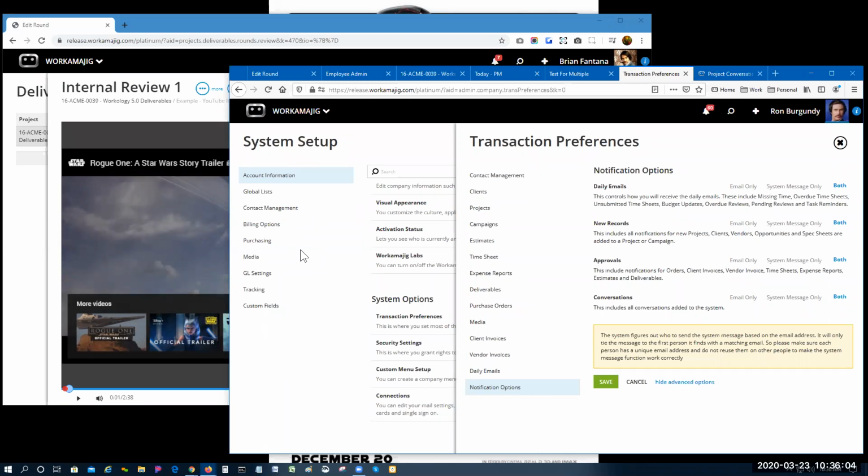Let's see, Danielle, similar to Julia's question about a phase of the project, you're asking more about putting projects on hold. Your definition of putting a project on hold may vary from our system's default design. The default design is to have a project status called On Hold, and you put it to that status, which makes it inactive and removes it from all the Today Creative pages. The schedule doesn't move forward, and you can't put any transactions to it.